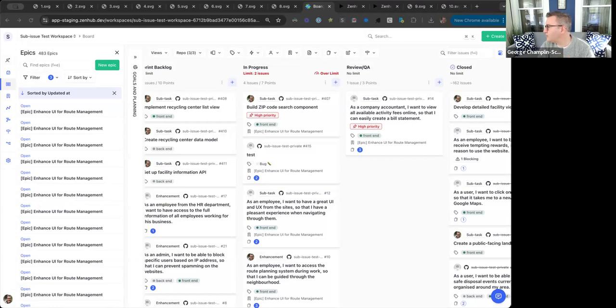Think about doing an MVP1, MVP2 kind of release for a longer term project. You could say out of this project, these 3 epics and all of their children, we're going to put in milestone 1. These 2 epics and all of their children, we're going to put in milestone 2. So you can use GitHub milestones.